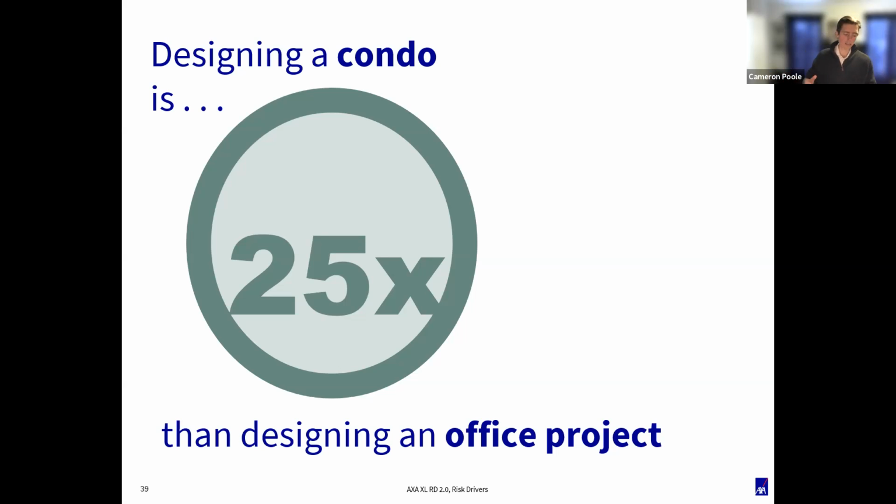So in terms of condo projects, proactive measures to take: make sure you get a really good contract on those projects. Be even more strict in what you're looking for in your contracts, limitation of liability. Try to work with reputable developers that have been in the space, that know what they're doing. Rookie developers, oftentimes we see more claims from them because it's their first rodeo. They haven't seen issues on other projects, so a small issue seems like a big issue to them. The other thing, in line with that, is the contractor. You want a good contractor on those projects too.